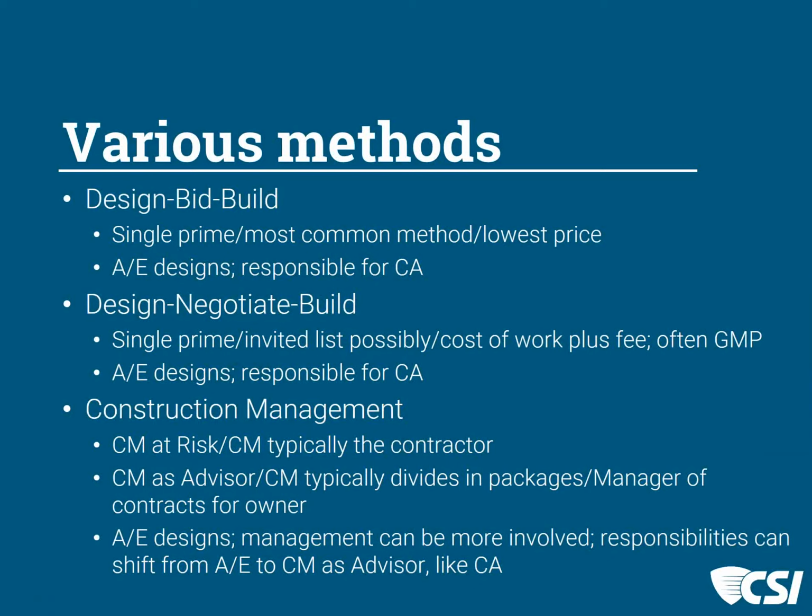These may be used more often in specific types of work where experience is much more important, maybe in the correctional field or in some health, particularly mental health fields. There are state-owned properties. And sometimes these come as a cost of the work plus a fee, where there is a guaranteed maximum price. So again, we as the designer are responsible for the construction administration for our clients.